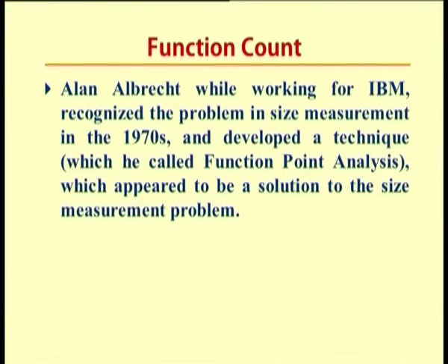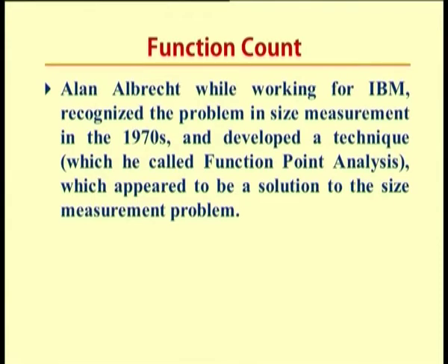One particular aspect where I will concentrate on the cost factor is the function count. So what kind of functionality is involved for studying the cost? So we estimate using the function count methodology. Alan Albrecht, while working with IBM, recognized the problem in size measurement in the 1970s and developed a technique which he called function point analysis, which appeared to be a solution to the size measurement problem.